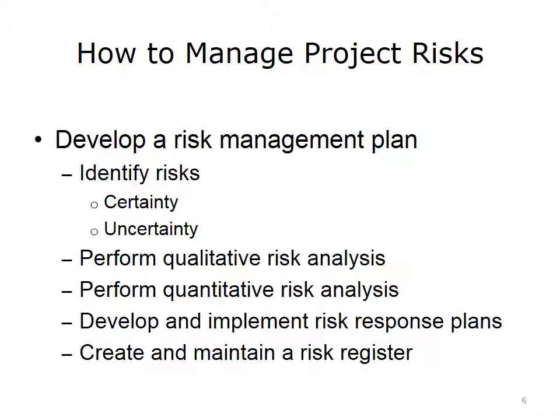Once you've used these analyses to pinpoint the high-priority risks, you would develop a plan to continuously monitor these risks. Many low-priority risks are also monitored because if conditions change, these risks could shift into high-priority risks that impact project objectives. Identify and track new risks as they arise, and implement risk response plans during your project's progress.